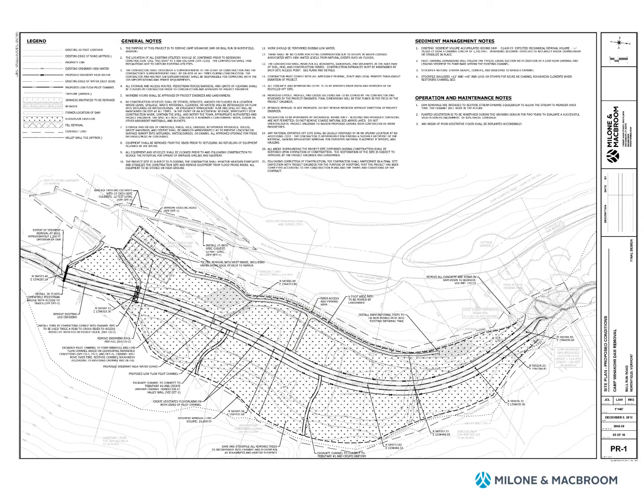The dam will be removed down to bedrock, generally in this area. The pool will be removed completely and regraded, including removal of fill around the pool. Adjacent to the pool area, there's a shed and deck that will remain, as well as a treehouse area and items stored under the treehouse that will remain adjacent to the staging area.